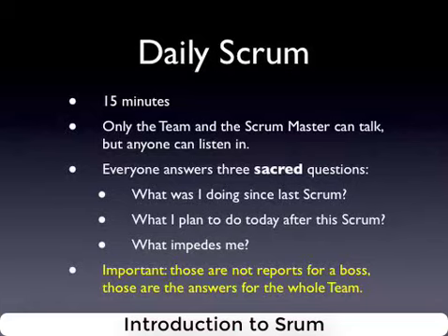So on the sprint backlog, we have those tasks, we have those hours, and as I said before, all the developers, all the members of the team, not only developers, are required to daily, at least daily, before the daily Scrum, update the hours for each task. If the task is closed, completed, it's marked as such. If the item is delivered, it is marked as such, and it is always an outlook into the future. As I said, it's always how many hours I believe this task will take from now, even though I might have worked on that task before. How much time will it take from now?